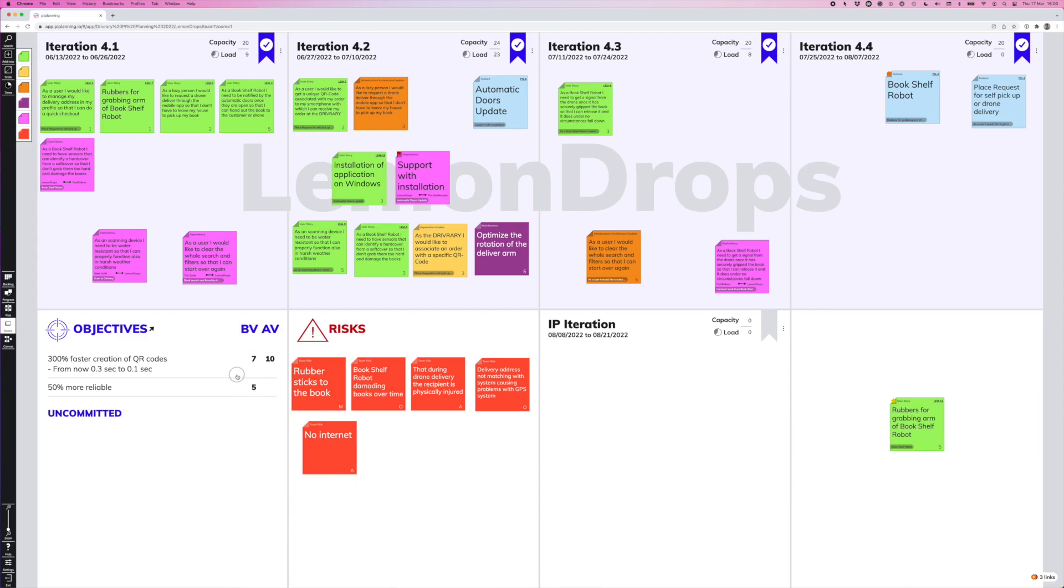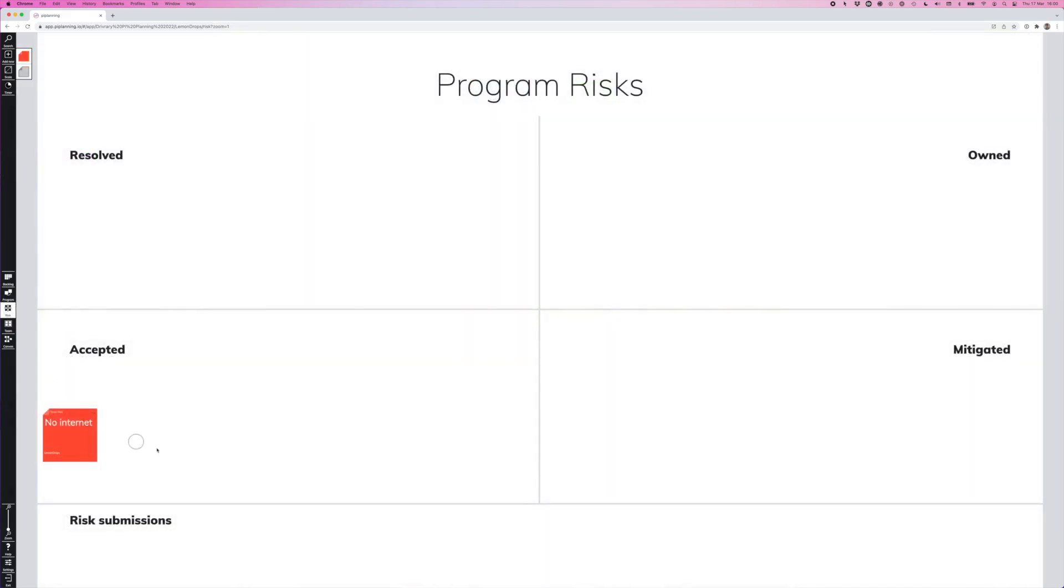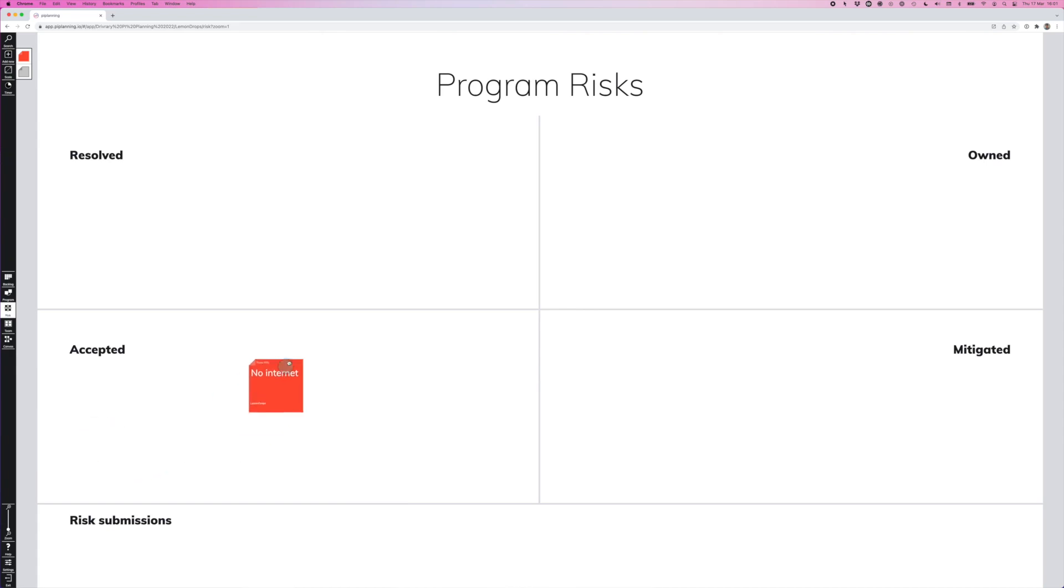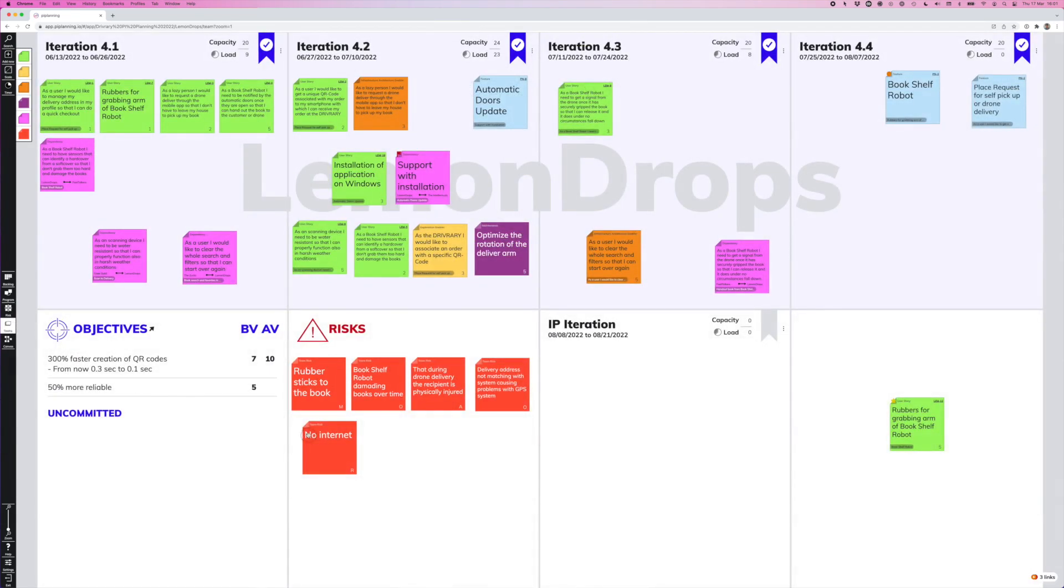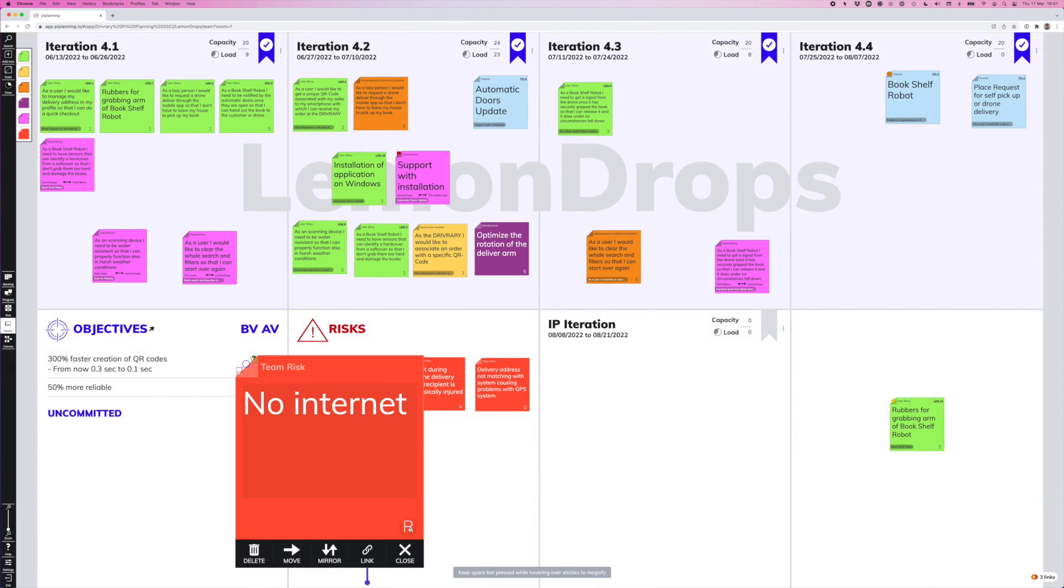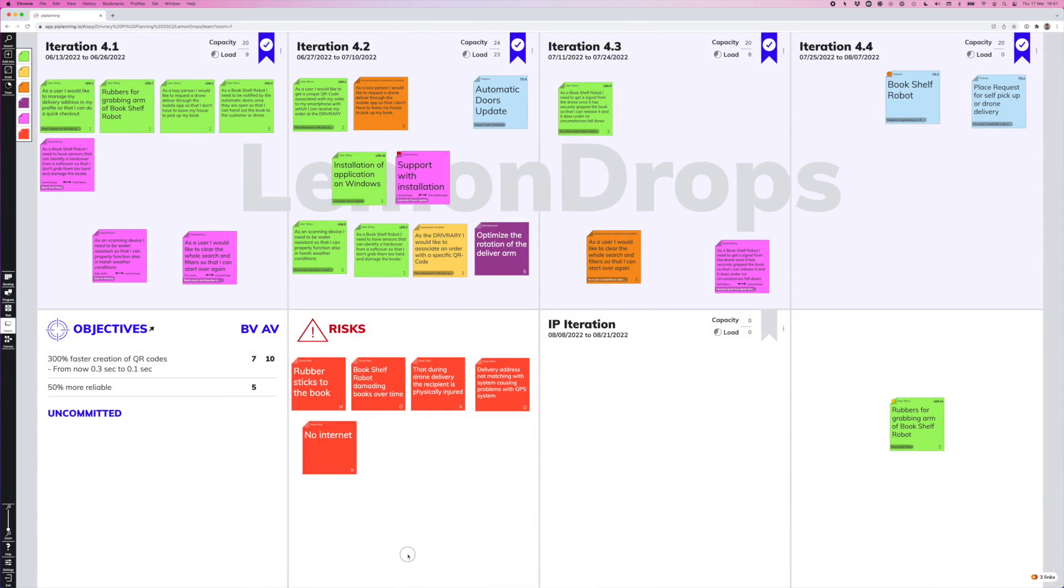Now, I showed you how mirror works with the feature. It's the same sticky on two boards, always in sync. And here it's exactly the same. So now this sticky is also on the program risk board under the accepted area, because we already labeled it as accepted. If there is no label, the risks from all the teams that are submitted, they come in in the risk submission swim lane down here. And these risks we can then address during program risk session of PI Planning and address them one by one and drag them to the dedicated spot here on the board to ROAM them. And if we update here, this risk and place it in resolved, then on our team board, it's now also resolved. So that's how the mirror works.